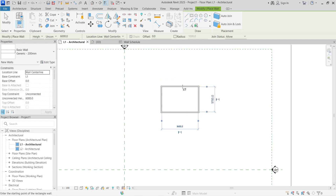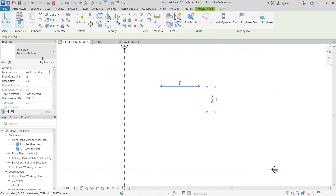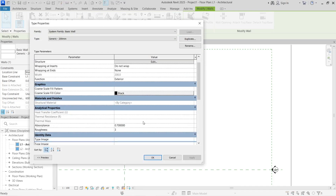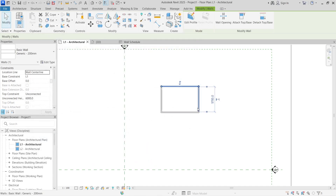Once the rectangle is drawn, go ahead and assign a material cost to the wall. The cost of wall construction will differ by country. Go back to the wall, open Edit Type in the Properties tab, and scroll down to find the Cost property. I'll enter a value of $15 per square meter to construct one square meter of wall. Click Apply then OK. Now every wall with the Generic Basic Wall 200mm type will have an assigned cost of $15.